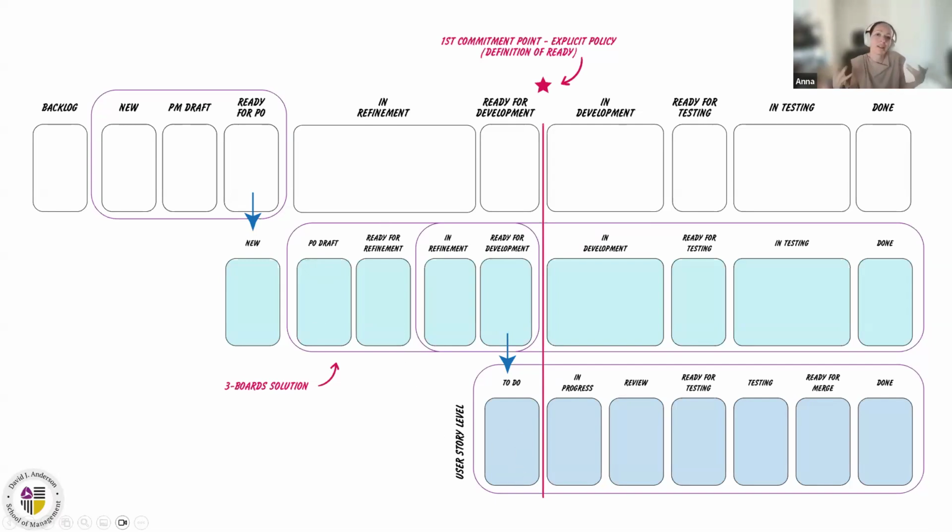Each team tracked their piece of work, and together they formed the epic, and then a few epics formed the feature. They were all linked with parent-child relationships, with some automations introduced in the visualization system. So they didn't have to track that this item moved, so now that item has to move. It all happened automatically. For example, if an item here moved to development, the epic also moved to development.